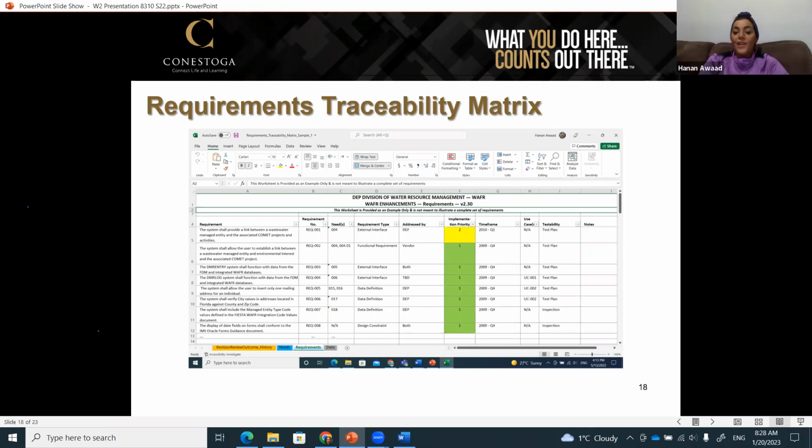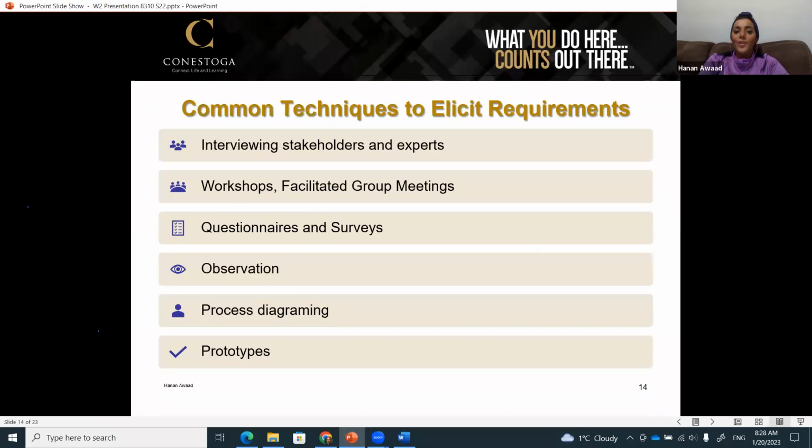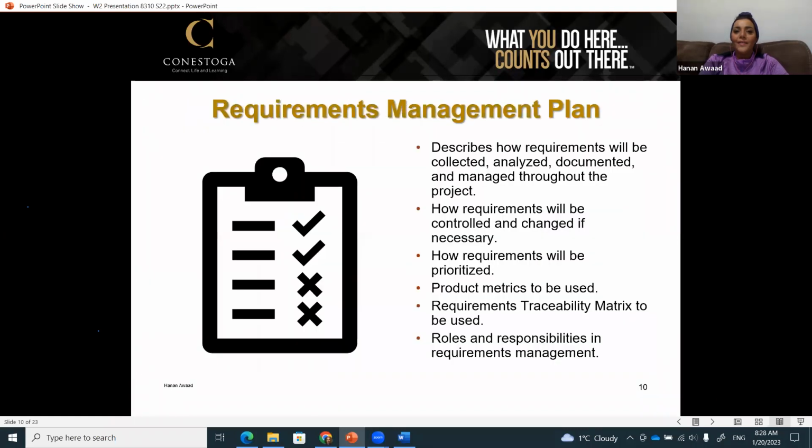Yes, this is a very good question. When we were doing our planning, remember, when we were doing our requirements management plan, we have guidelines on who will help or be involved in prioritizing the requirements. Say we have 10 stakeholders. Not all of them will be included in the prioritization. Maybe I don't have access to all of them at the same time, or maybe their role is not as important as other stakeholders.